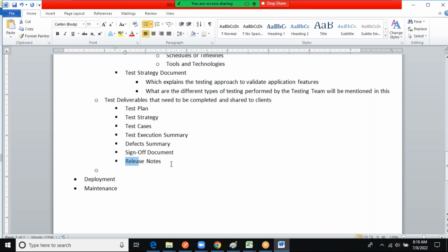What is the release version number? Software versioning, I mentioned in the beginning also, again I'm telling, for every release there will be a unique number or unique code given to track which features are released in which version. It's kind of V 6.2, 6.3, 6.4. When you do sub releases, and when you do a major release, it will become 7.0. Like that, the release version will be maintained.